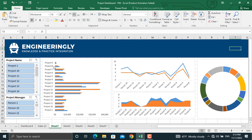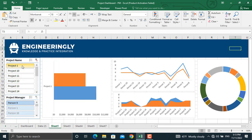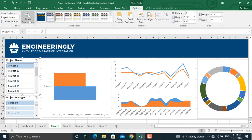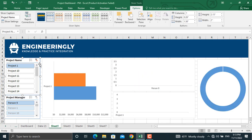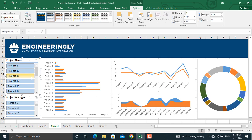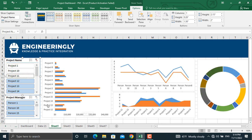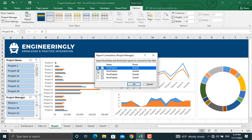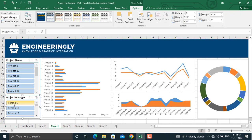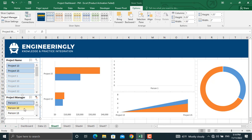Since we have inserted the slicers only for this chart, clicking any project will filter that specific chart only. In order to connect the slicer to all other charts as well, click the slicer, go to Slicer Tools and select Report Connections, then connect it to all the other charts and click OK. Now if I remove the filter, information for all projects will be shown. If I select a number of projects, the information specifically for those projects will be shown. I'll do the same for the next slicer — go to Report Connections and connect it to the other pivot tables and pivot charts, then click OK. Now if I click any person, the information will be filtered for that specific project manager.